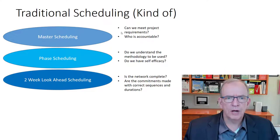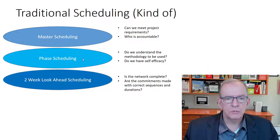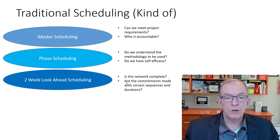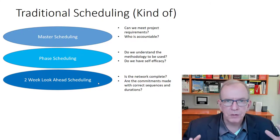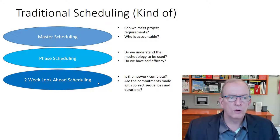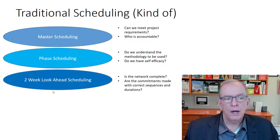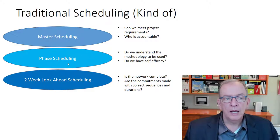Can we meet the project requirements? Who is accountable? Do we understand the methodology to be used? Do we have self-efficacy and confidence that we can actually meet these dates? Is the network complete? Do we have everybody in place? Are commitments made, and have we made adjustments to sequencing and optimized the order of work? Because we're going to have a lot more detail two weeks out than we will at three months out, and a lot more detail at three months out than at the end of the project.